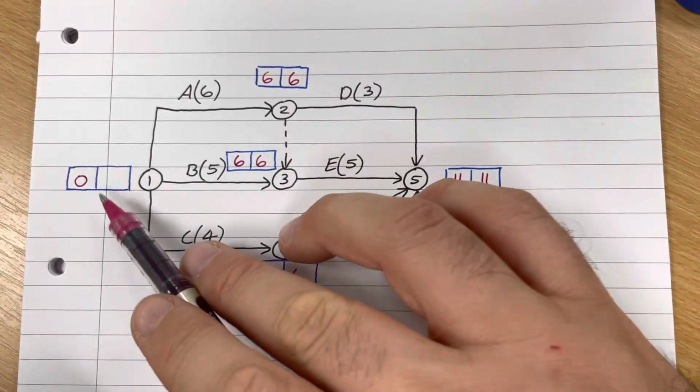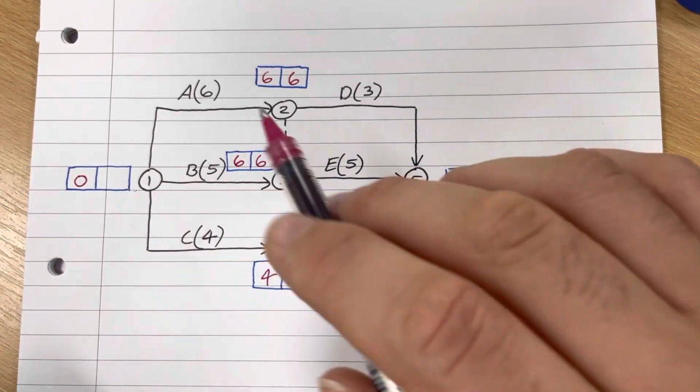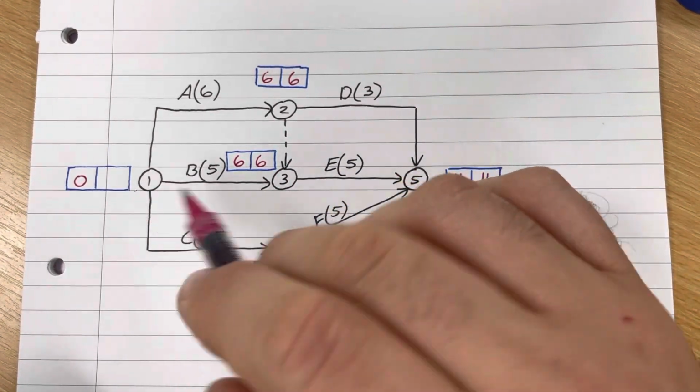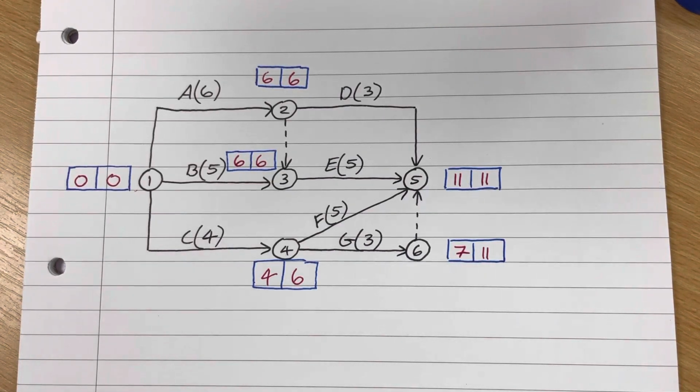And then finally, I've got three inputs at the start. So 6 minus 6 is 0. 6 minus 5 is 1. And 4 minus 4 is 2. And the smallest of those is 0. Okay, so that gets put in there. Right, that completes the analysis.